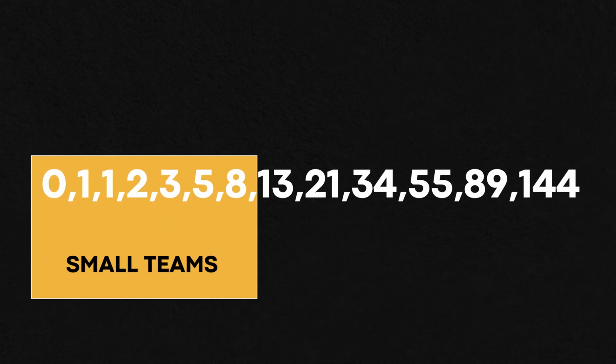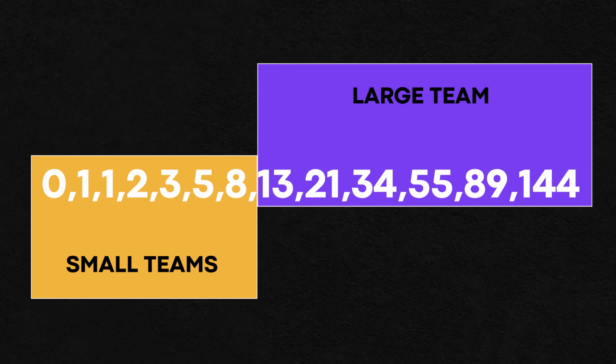Some places I've seen that could be as little as a chore that you do. The highest number could speak to an unknown. In fact, that tends to be a general rule of thumb. If I don't have enough information to point this, it is the highest it could possibly be. It's also a sniff test: if something is the highest point that it could possibly be, it probably should be better defined and possibly broken up into smaller tasks if possible.